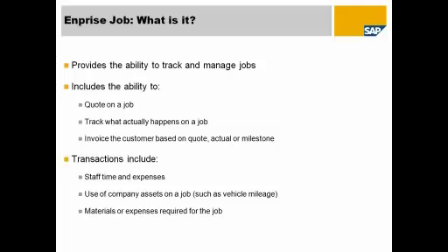That would be an example where I have a job for a customer. We've done all the contract negotiations, and the agreement is that perhaps they will pay 25% the day we start, and then we may have some other milestones throughout the project. They'll pay another 25% at a certain time, so we can handle that as well.